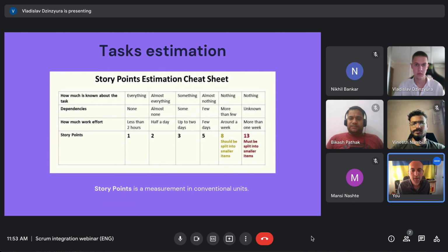If you estimate a huge task, like 1 month plus, or a many-weeks task, then you will just put some arbitrary number there. For example, one software engineer will estimate some large task as 120 hours, another developer will estimate the same task as 135, or somebody will estimate it as 133. It will be the same task.